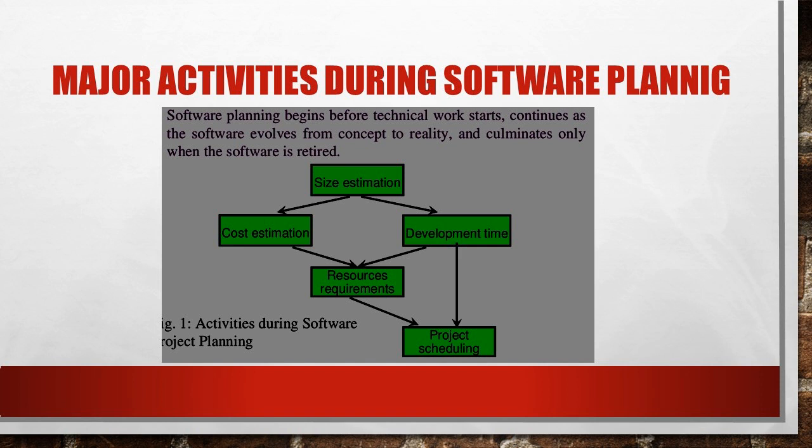There are some issues that affect the uncertainty in project planning. These may include project complexity, for example, real-time signal processing versus analysis of examination marks. Then project size: sometimes as size increases, the interdependency between its components grows rapidly, so there can be some uncertainty. The degree of structural uncertainty can also occur, that is, the completeness and finality of the requirements can be a problem.